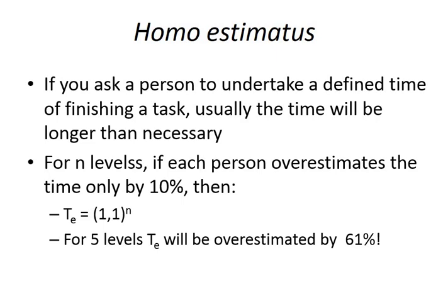If they do it just by 10%, and if there are 5 persons like that, the total time that you get is going to be 61% longer. So it will probably cost you losing the project, because nobody is going to agree on such a long project. So what can you do?